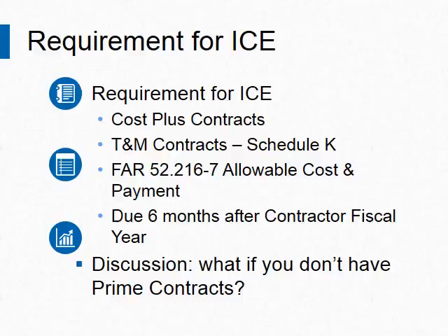If you have cost-plus contracts, cost reimbursable contracts, you're probably going to have to create an incurred cost submission, an incurred cost electronically. That's because you have billed during the year at provisional or estimated billing rates for overhead and G&A. And the incurred cost submission is how you settle up with the government and say, here's what our actuals were. We want to be able to bill our variances, or if we underran our rates, we're going to owe the government some money, and we need to figure out how that's going to work.